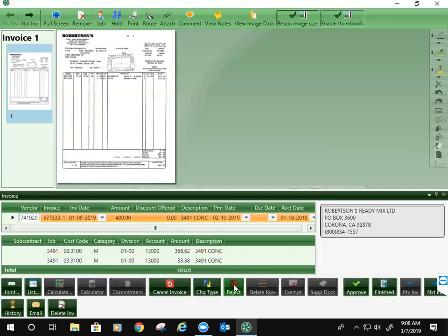The other thing to not reject an invoice for is for subcontracts. We're going to process subcontracts as they're billed, so they'll come out with the original contract, they'll come out with change orders. If you get an invoice that doesn't have a change order approved on it and they're billing on that amount, Pearl or Jinky or whoever's coding it, they'll give you a comment on there. So when you open up the invoice, the comment will come up and say it needs change order number 2 to be approved and put in the system.